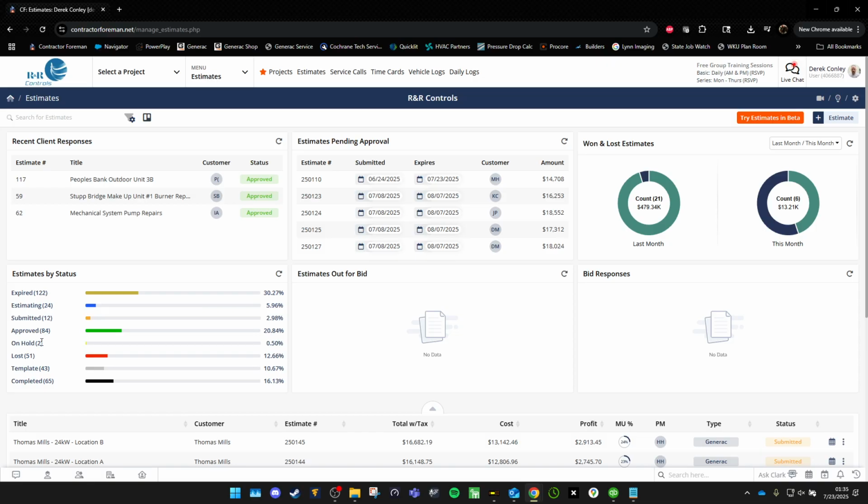On hold, that means the customer has it, but some other things are in play, and they're like, hey, can you hold your number for a little bit longer than what was put on the estimate? Typically, estimates are good for 30 days.